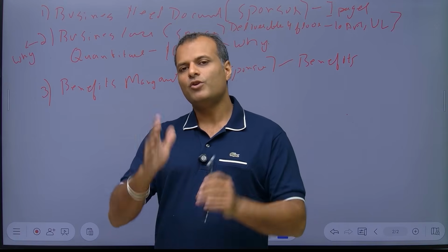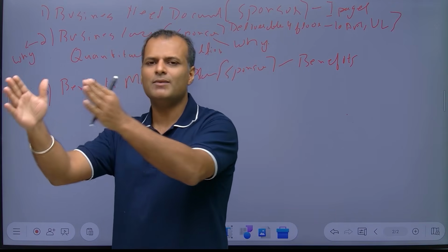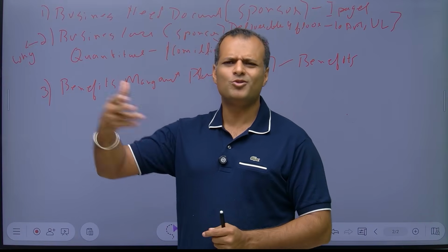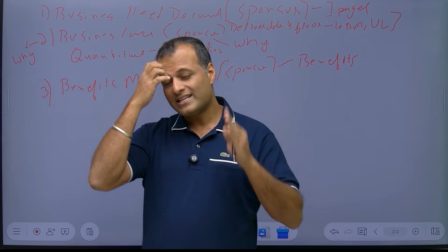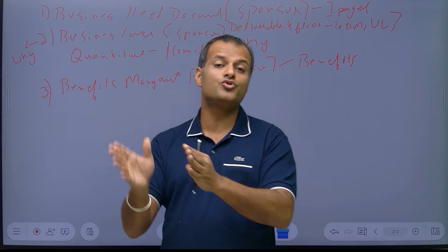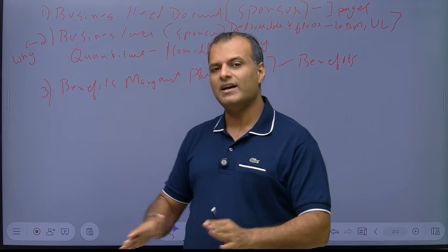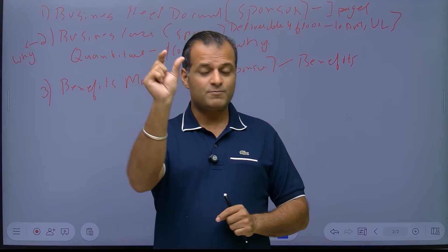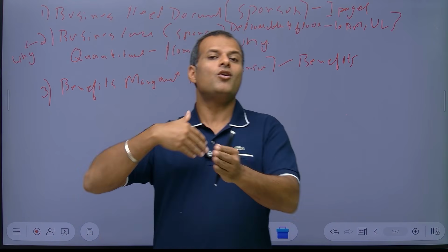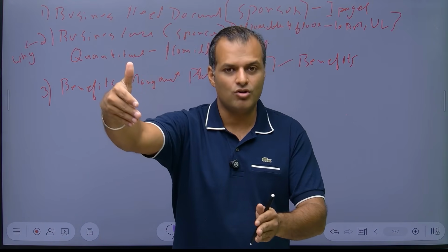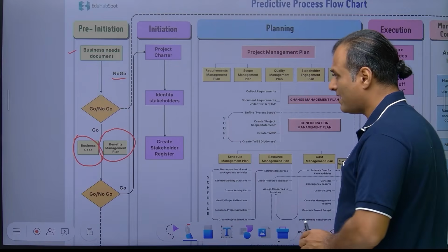That's a benefit. What you do is you assign each benefit to a benefits owner. It could be a sponsor, an operations manager, or a project manager, but each benefit has an owner whose responsibility is to make sure that this benefit gets achieved as part of the project. You will have a specific date, whether you get this benefit immediately as you launch, or it's a long-term benefit. You do this as part of the benefits management plan.